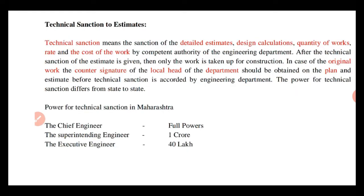Next, technical sanction. Technical sanction means the sanction of the detail estimate, design, calculation, quantity of rates, and the cost of the work by the competent authority of the engineering department. After the technical sanction of the estimate is given, only then the work is taken up for construction.